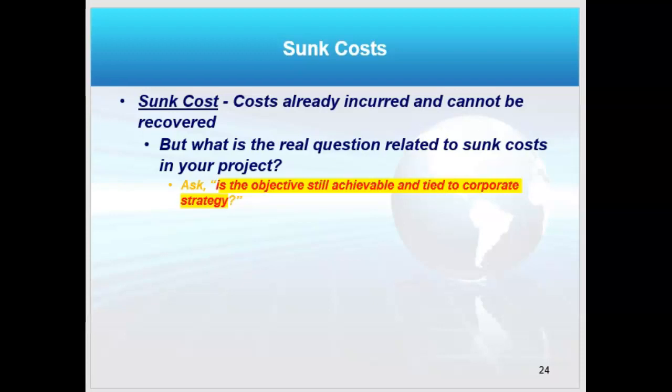Yes, you'll have to explain them to your boss. Yes, you'll have to tell them why you have sunk costs and you're not on budget. But if the objectives are still achievable and still tied to corporate strategy, the project should continue. Sunk costs are not really a reason to cancel a project.